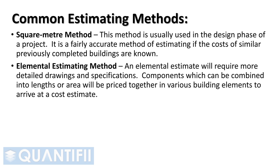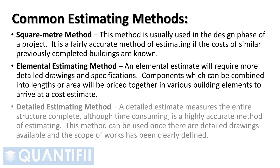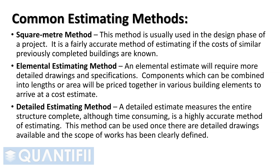Elemental estimating method. An elemental estimate will require more detailed drawings and specifications. Components which can be combined into lengths or areas will be priced together in various building elements to arrive at a cost estimate. Detailed estimating method. A detailed estimate measures the entire structure complete; although time-consuming, it is a highly accurate method of estimating. This method can be used once there are detailed drawings available and the scope of works has been clearly defined.